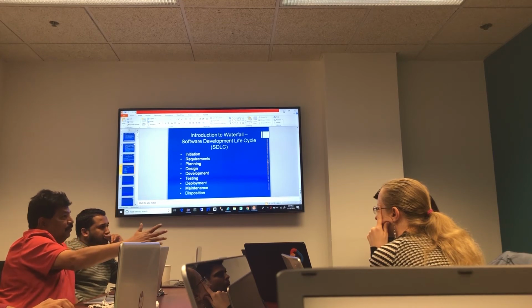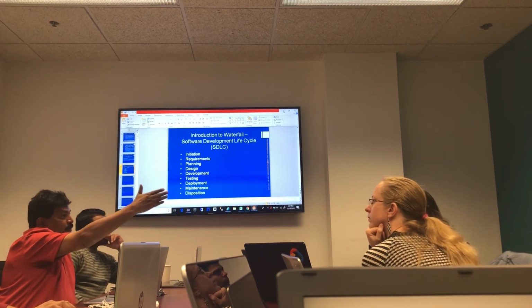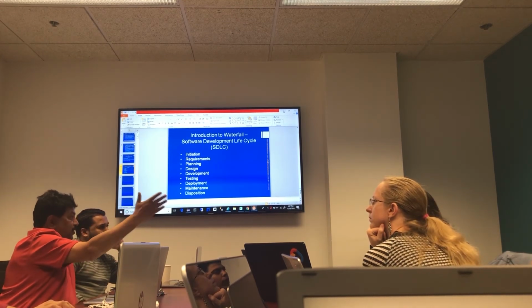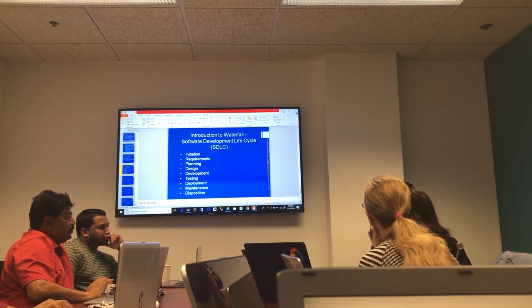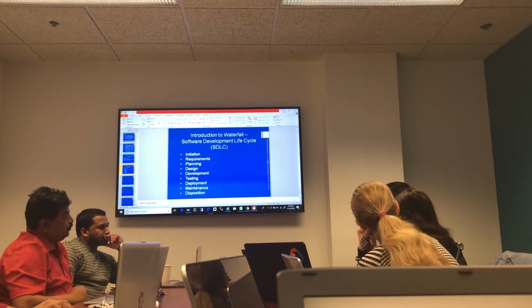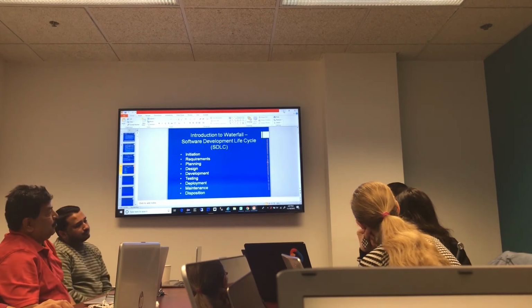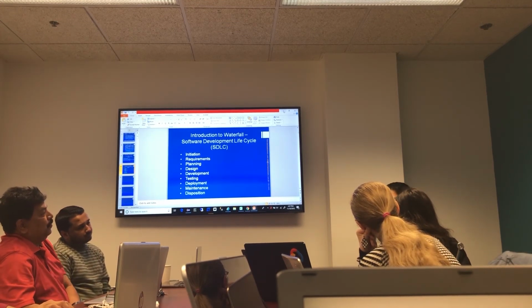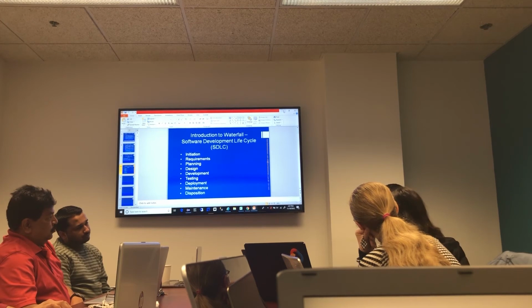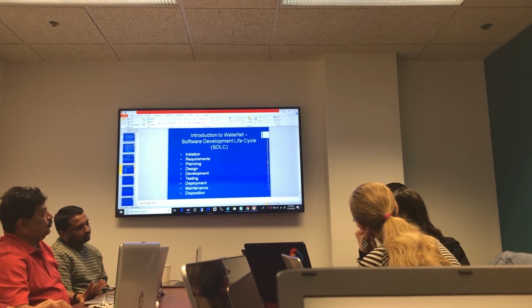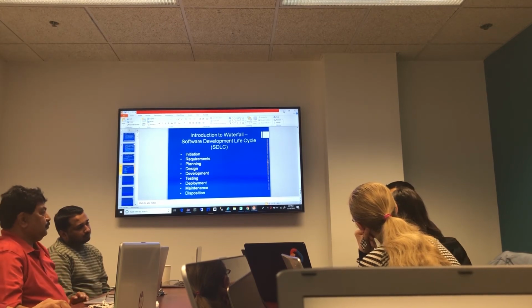At that time, the owner comes and says, I want to add that money transfer. That is called a change in requirement. So how we handle that is, depending on at which stage the client says it, the business analyst can say we can do it. The first thing the business analyst can say is that we will do it in release 2. We are doing release 1 right now. We will add this functionality in release 2. But if the client says, no, I want it in release 1, then you tell the client that this is how much it will cost.